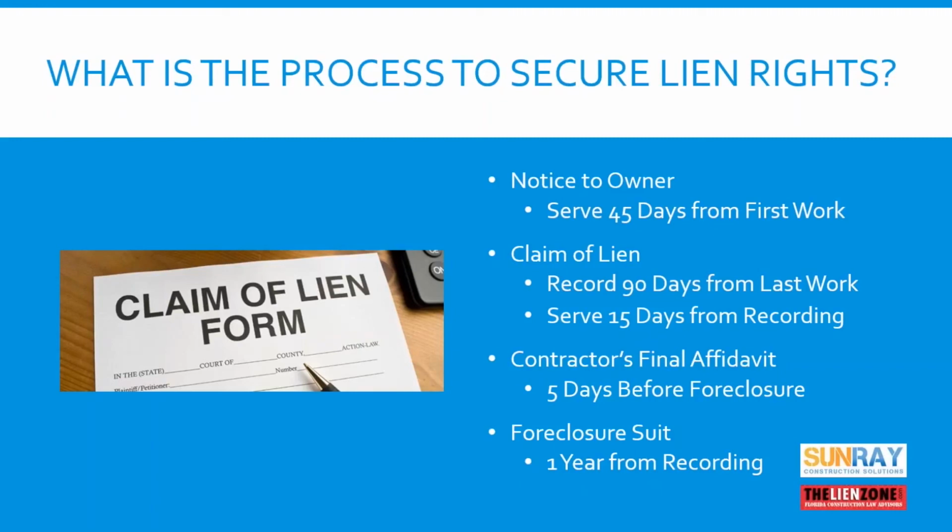Our advice is that you should be seriously moving forward on preparing your lien when you hit about 60 days from your last work, so that you're not running up until the very last minute to record your lien. And then within 60 to 90 days of recording your claim of lien, you should be seriously considering moving forward, unless you have a specific factual or business reason not to. Every day that goes by that you are not attempting to collect debt that's on your books makes it that much harder to get paid.